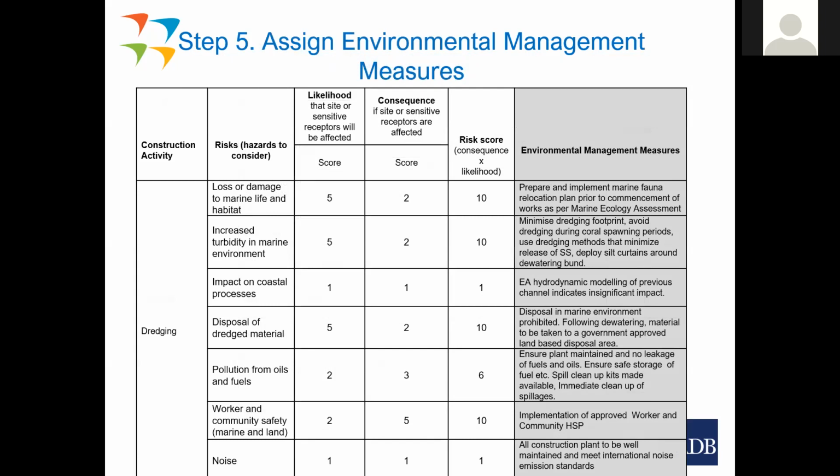So for loss of damage to marine life, we prepared and implemented a marine fauna relocation plan prior to commencement of the works, as recommended in the Marine Ecological Assessment, and this was done by the implementing agency, by the government. We did not. You can put some of these requirements in for the contractor, but in the case of ecology, it's not their core business. Doing ecological assessments, doing anything to do with ecology, it's not the contractor's core business.